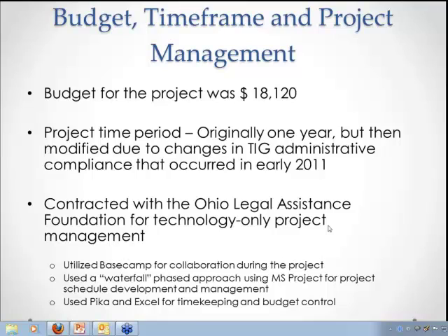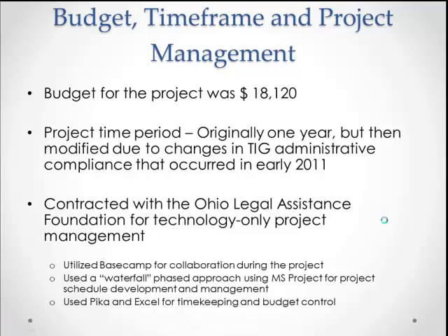Okay, so in using the waterfall approach, we used Microsoft Project as our schedule development tool and to manage the various activities and tasks on the project. And we used Pika and Excel for timekeeping and budget control. For the legal service programs who use Pika, they're able to track their time, and we set up the capability for Crystal Reports to run automatically and generate the time reports. Then we use Excel to compile and maintain both the time that was spent on the project and also to watch the budget, what was budgeted versus the actual. So those are just some of the tools that we've used to put this together.